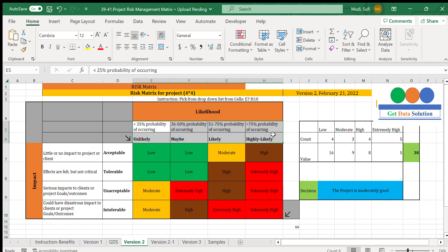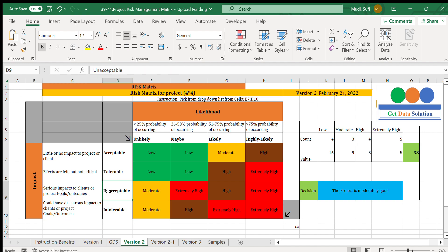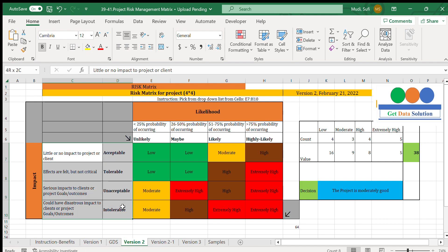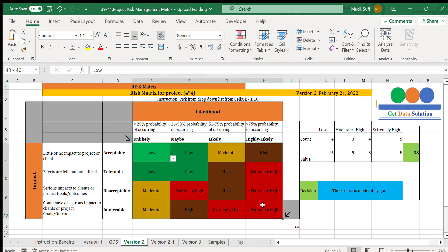For the impact levels: little or no impact to the project or client is acceptable. If the effects are felt but not critical, that is tolerable. Serious impact to client or project goals or outcomes is an unacceptable level. And if it could have disastrous impact to client or project goals, that will be intolerable.